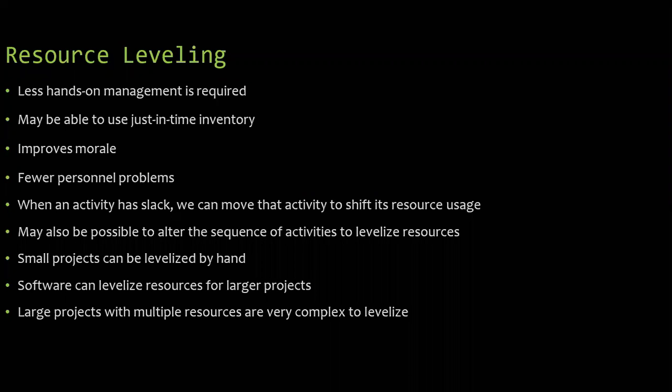So according to your scheduling point, suppose you started the work on 1st of May and you have made the proper schedule, and you told the mixing machine person that you want this mixing machine on, suppose, 10th of July. So from 1st May to 10th of July, you had a plan to complete foundation work, column and beam work, and on 10th July start the slab work. That's why you call that particular mixing machine on 10th of July.